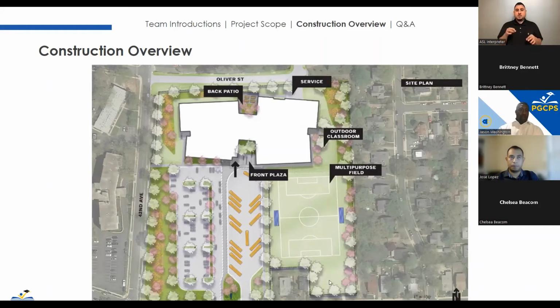Could you go more into the acquiring of the houses? Well, we are utilizing the properties that we owned and did not want to get into the acquisition of additional property. Additionally, that's what has been seen in many of the other public-private partnerships, the potential delays and the conflicts that exist when there's not full ownership of the underlying property on which the asset will be built. And so that was a factor that played into it. And additionally, it was someone's house that they've bought, and they have planned to live in, and so it never was raised, and we never considered acquiring those two houses south of the plans. Okay.